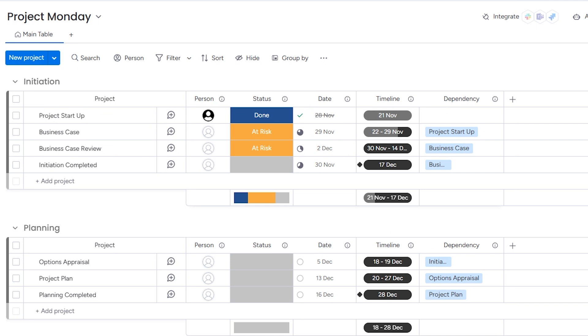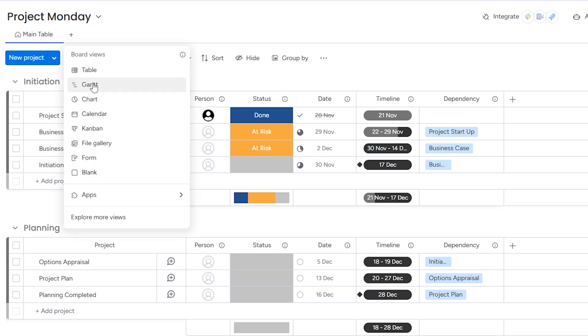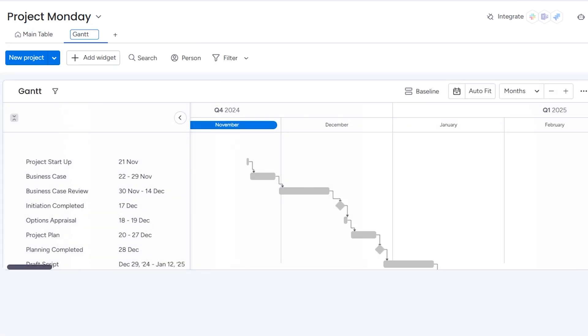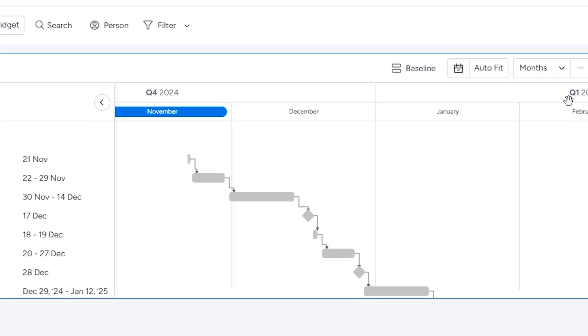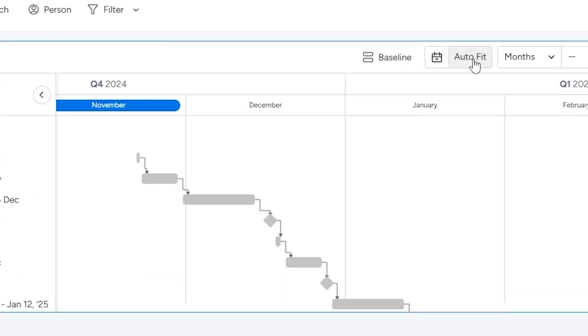Finally, the part that you came here for — let's generate the Gantt chart. Hit the plus sign at the top next to the main table title and select Gantt. And there you go. If it doesn't all fit on the page, hit 'auto fit' near the top. Or you can toggle the view by days, weeks, months, quarters, or years.